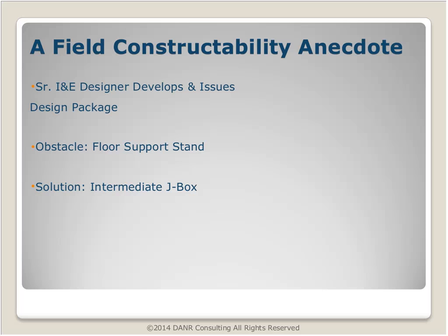The reason it was short wasn't because the cable length was too short. It was because we had to route around a floor support for a raised floor in the rack room. And because of the other underfloor cables, we didn't have any options for routing. We basically had to route around this.